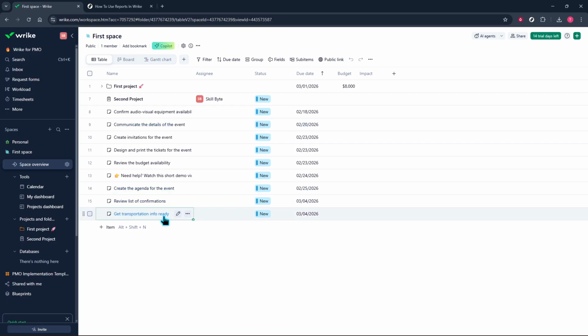If something seems off, the most common culprits are inconsistent headers, unusual date formats, or extra formatting in the spreadsheet. Cleaning those up and re-importing typically fixes issues fast. And if your source data includes a hierarchy, make sure your file reflects that with clear parent-child indicators before the next attempt. That's it. Your tasks are now in Wrike and ready for your team to use.